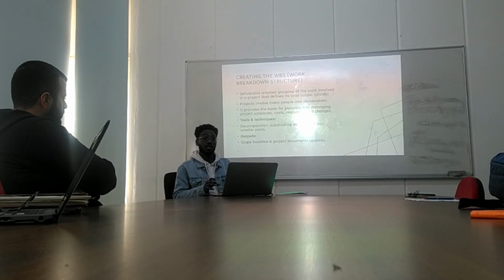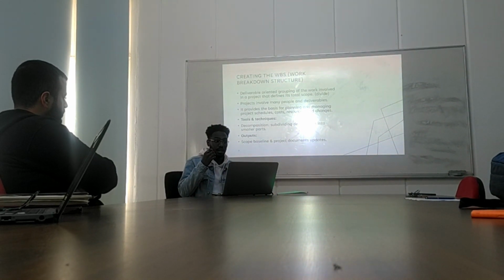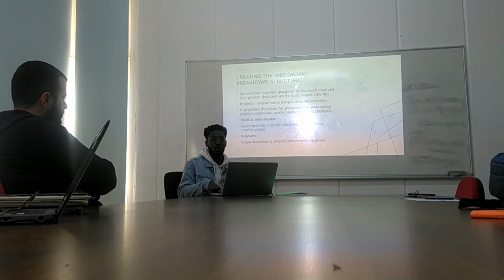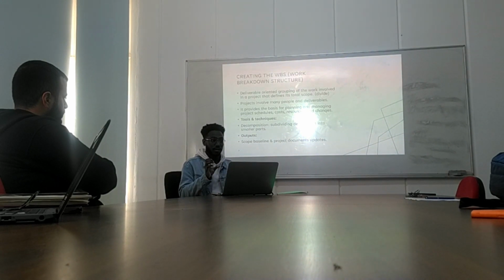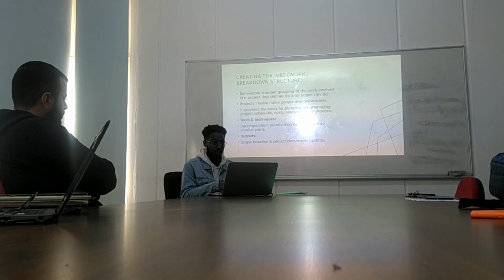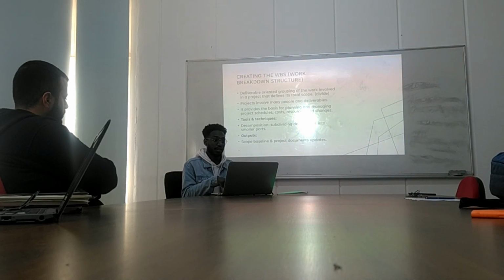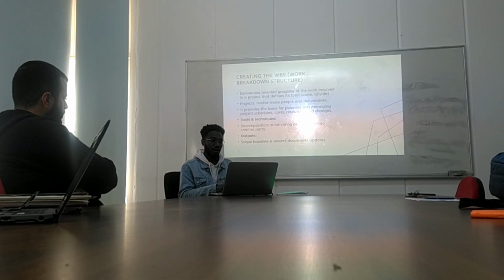So in each project that we have, we're going to have many activities and many people involved in this project. So when we create a work breakdown structure, we subdivide the tasks into smaller parts. Also, an important thing about the work breakdown structure is that it provides the basis for planning and managing project schedules, costs, resources, and changes. So the work breakdown structure is very vital and very necessary in the project that we want to develop.